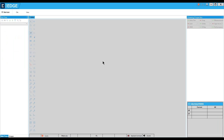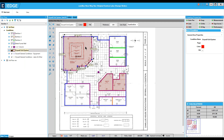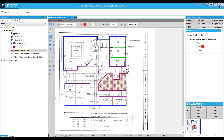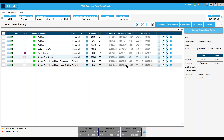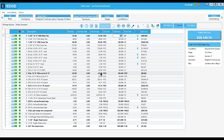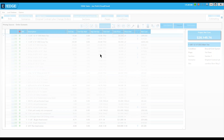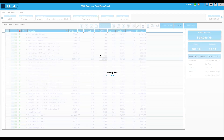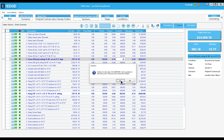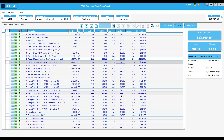On the ceiling condition I'll deduct this ceiling area. I can make a bunch of other changes, but that's all I really want to do for this change order. Notice the quantities are negative numbers because it's a deductive change. I do want to go to the labor screen — since it brought in the previous change order's wage, I want to adjust that back down to the wage that was set when this was originally configured.